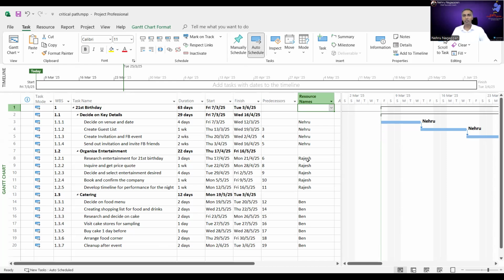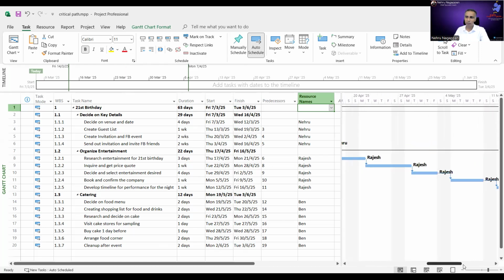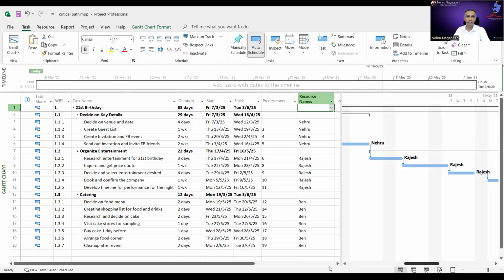Okay, team. Now I want to ask you this. I'm now entering into the logics of critical path, right? If you notice, team, what you're seeing now, the entire thing is a critical path. The entire project is critical at the moment. So why is it critical? Because the flow of the Gantt chart, you just look at it, it's just one after another, one after another, one after another until the last one. There's no dependency.